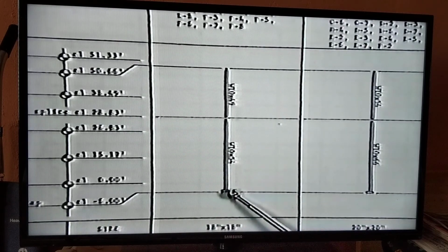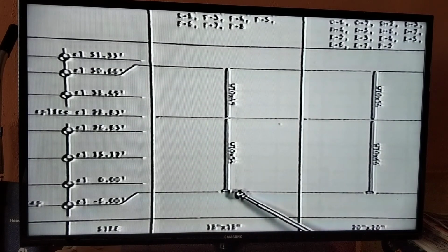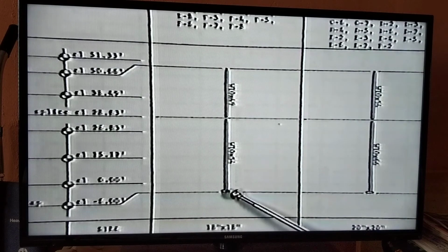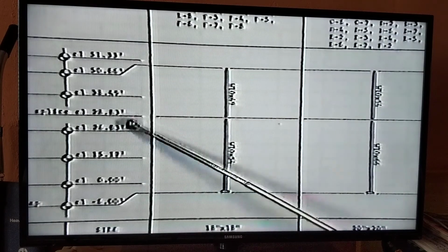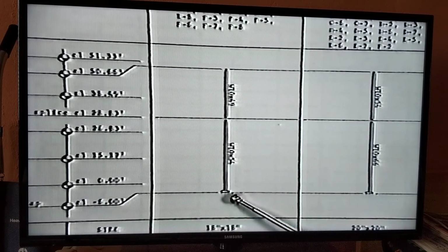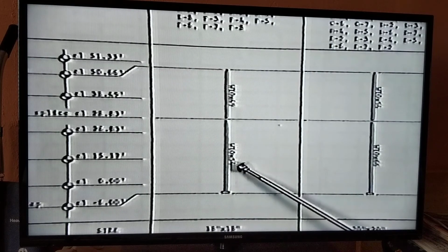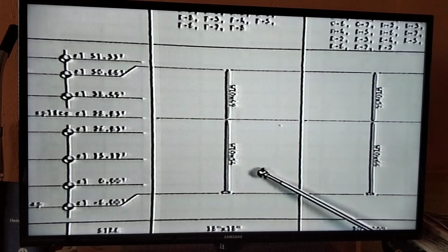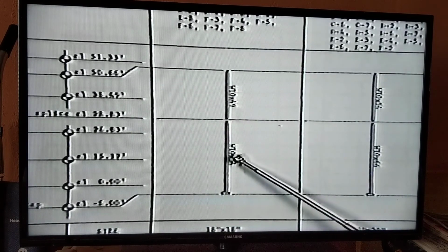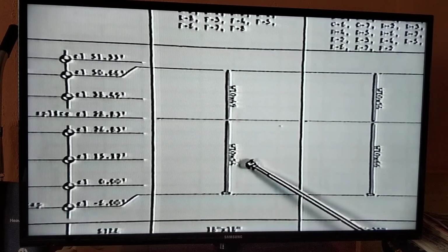We also have to take into account that this piece of steel is resting on something. The notes, which we always have to read whenever we're reading an exhibit, tell us that there is a base plate and there is 2 inches of grout that this is resting on. So we would have to take this gross measurement of 34.83 and subtract approximately 4 inches in order to get the net measurement, and then multiply it by 54 pounds per foot, and that is going to tell us what our weight is for that piece or that section. We add the two sections together, and we come up with the weight of that piece of steel.